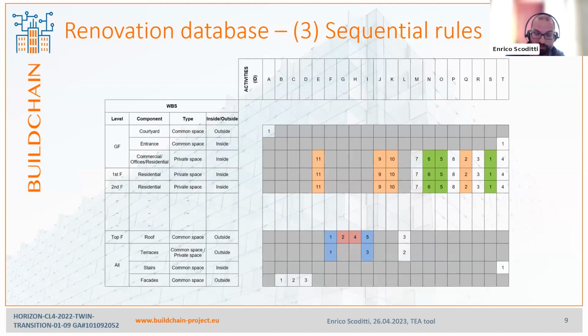The activities considered at the same working area are also timely ordered. Some activities should start first, some should be scheduled at the end. Others could be synchronized and done simultaneously, while others must be disjunctive and cannot be conducted at the same time.